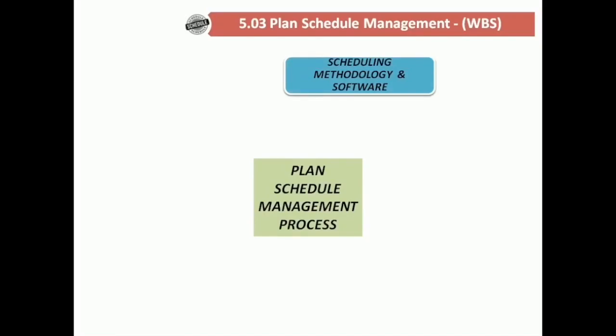Scheduling methodology and software. If a scheduling methodology like critical path method will be used to determine the project duration, this must be documented. Similarly, if Microsoft Project is being used for scheduling, this must be included as well. Establishment of schedule baseline. It helps to check whether the project is going as planned and whether the project deadline will be met.